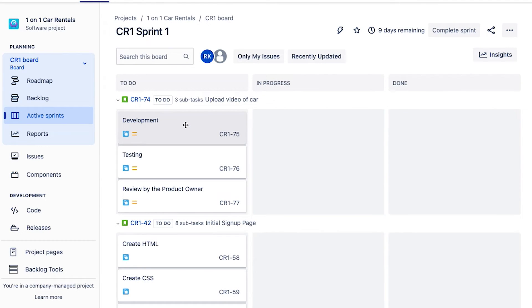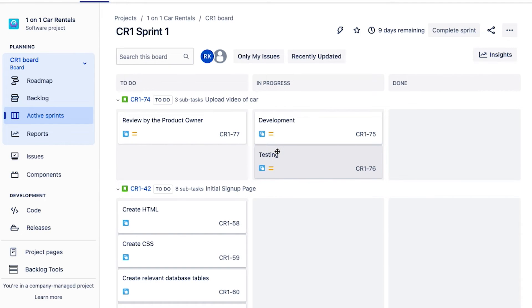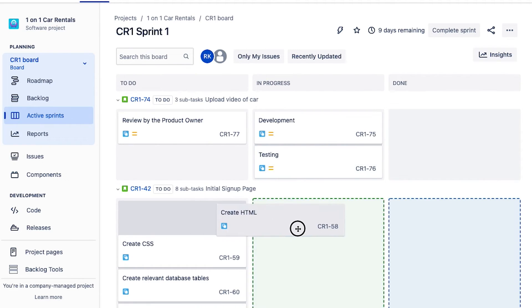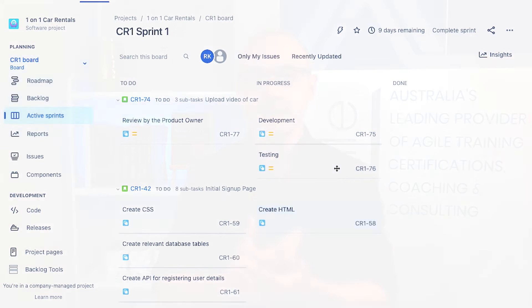At daily Scrum sessions I like the team to not only give those updates but also refer to the active sprint board — pointing out which tasks they are working on, and updating them if they're not current. We want the active sprint board to be a true reflection of what the team is working on. By doing this on a daily basis, the team can see what everyone else is working on, collaborate better, and be far more likely to finish their sprint plan.